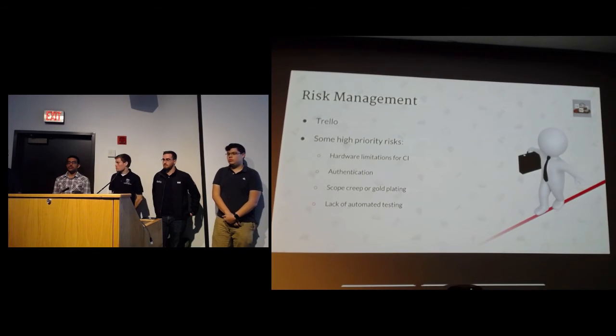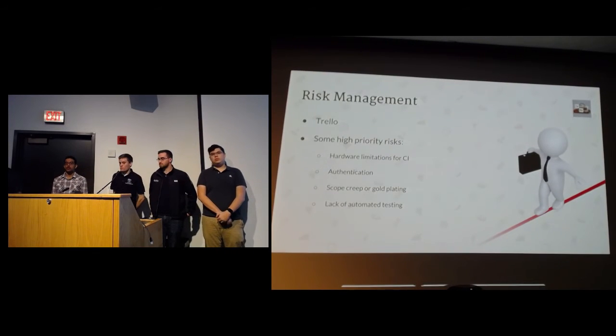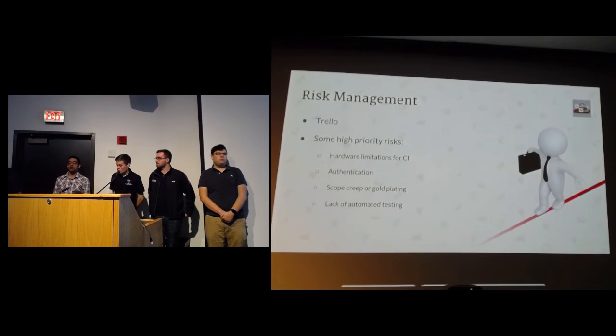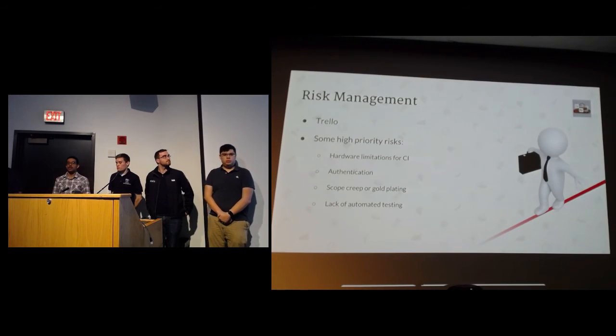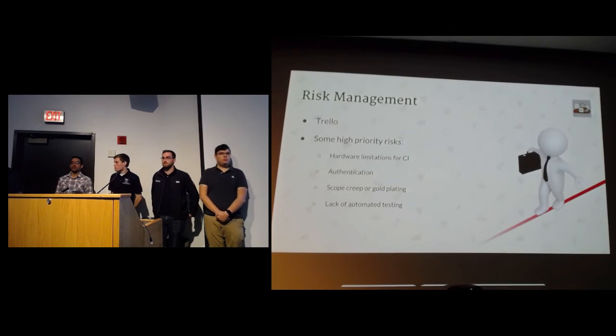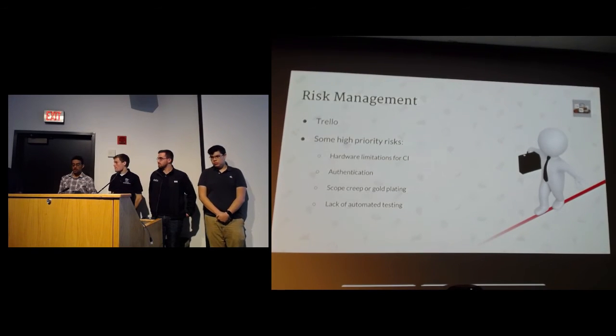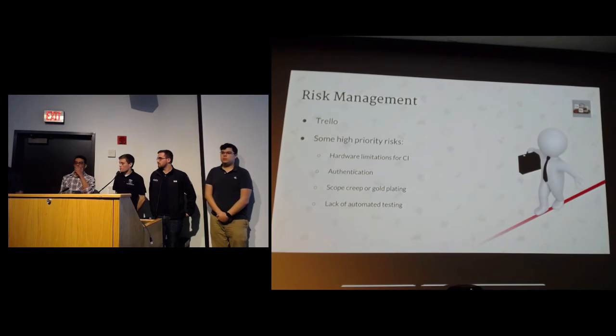We decided to appoint someone, myself, to be primarily responsible for risk management, to ensure that risk management doesn't fall by the wayside, risks don't go stale, and we can keep track of what's mitigated, what's changed, and so on.